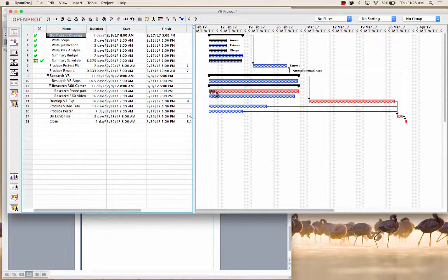The report at the end of this week would say, okay, this is a problem because we haven't made as much progress as we planned, and this task is on the critical path. So this should ring an alarm bell in the report at the end of this week. The weekly report should say that's a problem and what are we going to do about it.